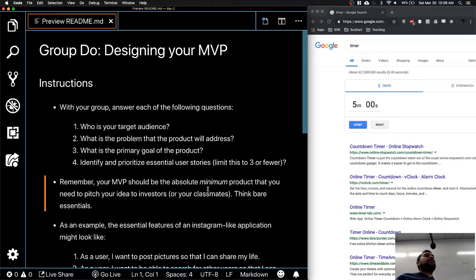Like, for example, liking a post. Let's suppose Instagram has that heart button. It's not really a minimum viable product. I mean, we can always go back and add this, but if you don't have the picture capability, your whole product, your whole basis of your product kind of goes down, right? If this is not working, nothing else over here matters, right? Next thing would be adding captions or hashtags, right? Captions. Again, I wouldn't consider this as a minimum viable product, MVP either. Why? Again, if I cannot even post my picture and nobody can see it, none of these matter, right?